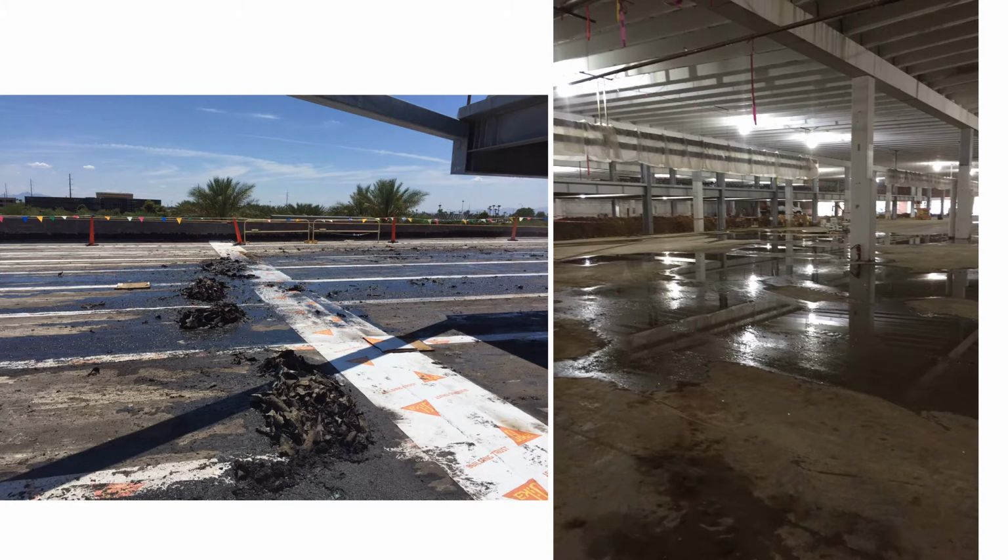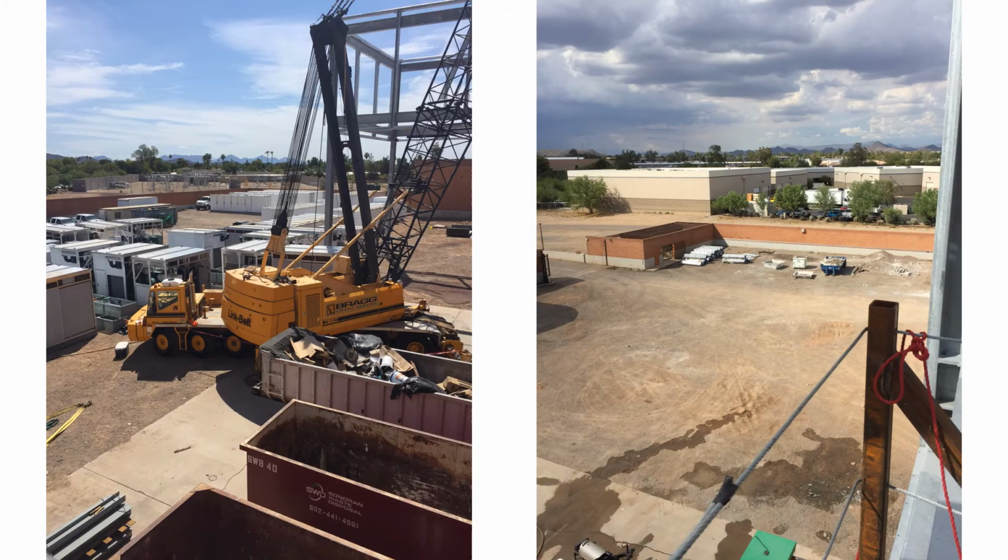It was difficult at times to allocate space and activities, such as when the roof was being power washed, dripping water onto the concrete curing below, and when two trades needed equipment at the same time. Fortunately for the workers, there was parking near the building. The crane was located in the same lot. Materials were stored behind the building. There was a trash chute in the back that goes directly into the dumpster. There were bathrooms already inside the building, and there was a temporary fence built in order to keep trespassers out.